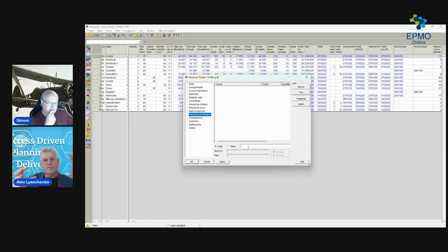Okay, let's assume in one part of the project you produce blocks. Yeah. And in another part of the project you use these blocks. So you have a quantity of blocks going up and down. This is production, this is consumption. So from dependencies, yes, you have an activity which needs this resource. Ideally you have something in stock, so you never delay because it's not available, but it's potentially possible. If for whatever reason you delay production of these blocks, some other activities may not be able to start because the block is not available. Okay, so it is a dependency. It's a resource dependency, yeah.